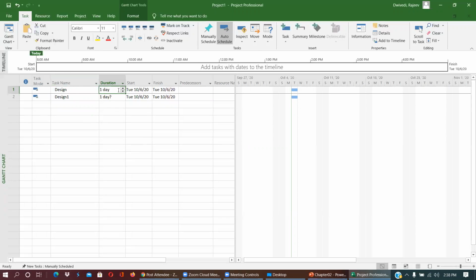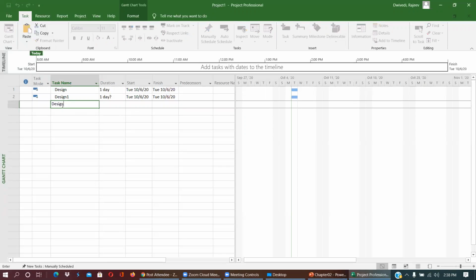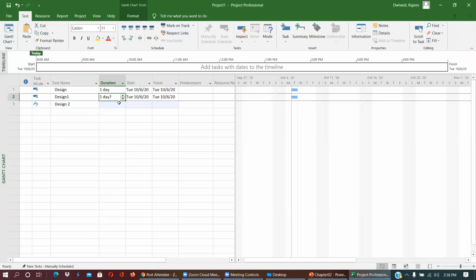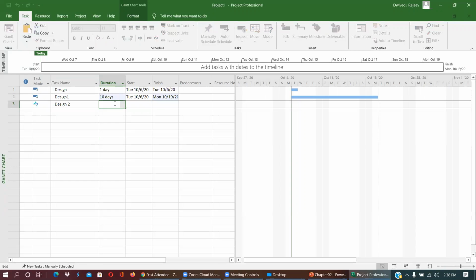So for example, here I can do design too. And let me put here how many days. I need 10 days, or I need 10 hours. Here I need for design 9 days, and that can start after, let's say, 6, or it can go till what time, let's say this is the time. So you can see on the right hand side, this is automatically shown.